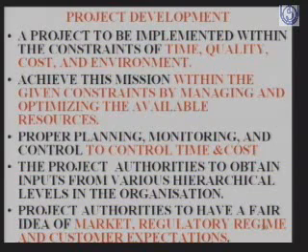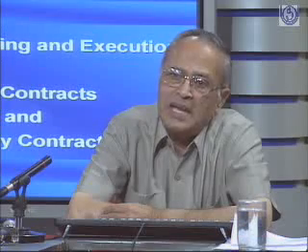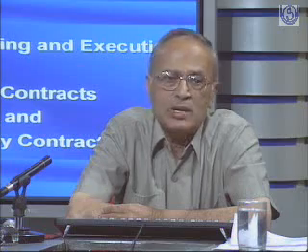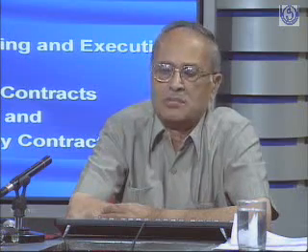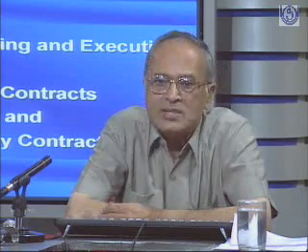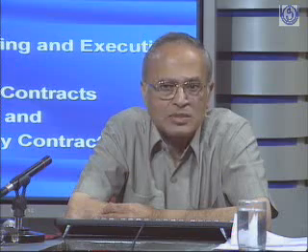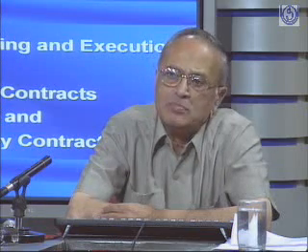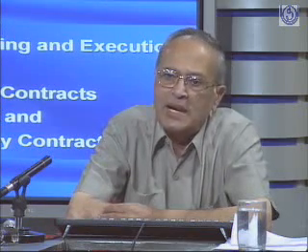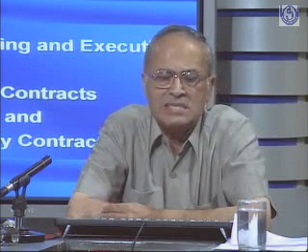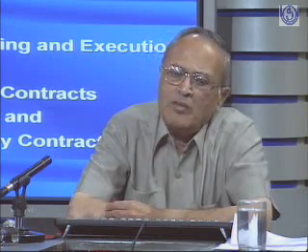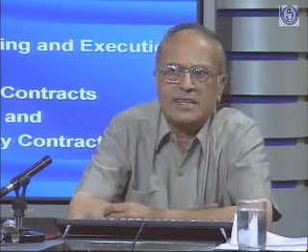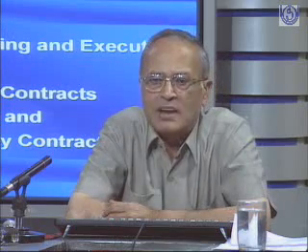So the longer the implementation period than I have planned for, the more there will be overruns in the cost of the project. And I have not planned the resources for it. If I have not planned the resources, I will be in a soup, because when I later go to some lending agency or promoters or anybody else with a begging bowl to meet the overrun, they dictate the terms to me, and those terms are very costly.